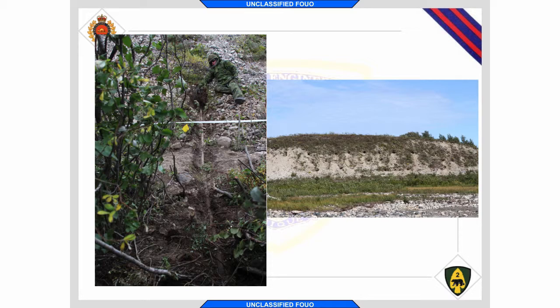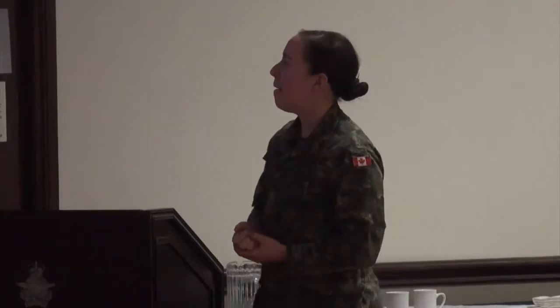The other picture there, you can see the holes from the excavation, so it gives you an idea of how the pipes were distributed, at least on that front face. Next. So our original COA, we wanted to hit as best the SOR as we can, so we were aiming to completely get these pipes out of the hillside rather than going for that limit of our detection equipment. So our primary COA was to try and pull them out.